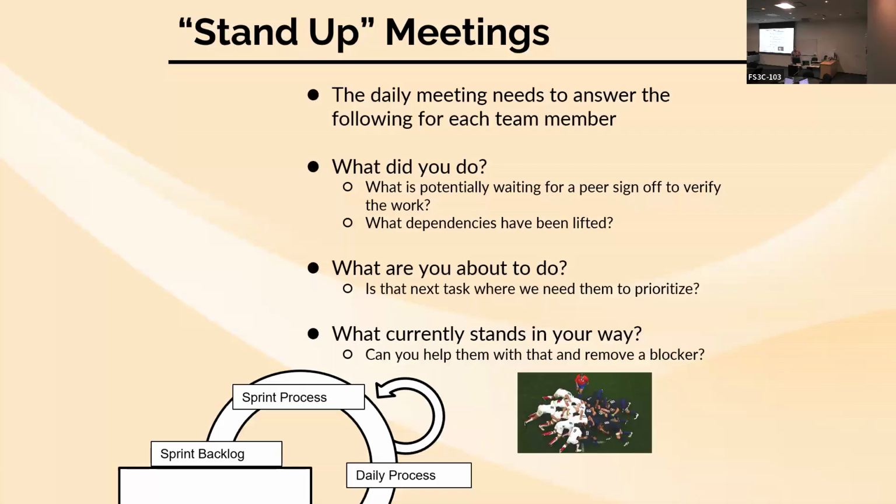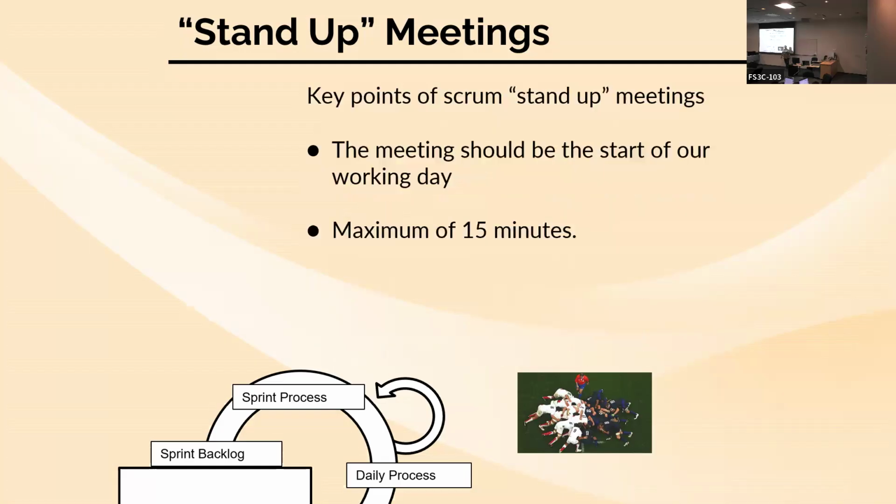All right, but anyway, so that's talking about blockers. That's the conversation everyone should have with the rest of their team every workday that they're working on the project. This should take the team 15 minutes. It should not be a long conversation. It should not be something that's a huge drag on everyone's process.